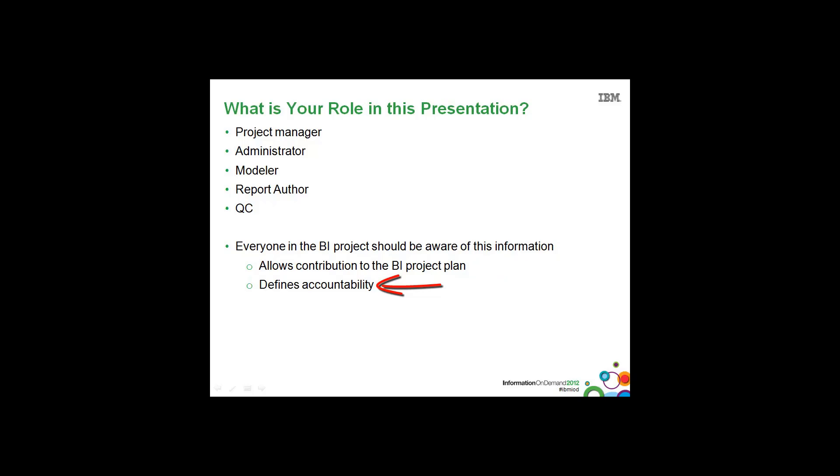So who do you talk to when you run into a problem? For example, a report author may find a key piece of information missing in the package that was published up into Cognos Connection, who in turn will talk to the metadata modeler. The metadata modeler may find that the key piece of information is actually not in the data warehouse and he can then notify the project manager and the DBA that this piece of information is missing.